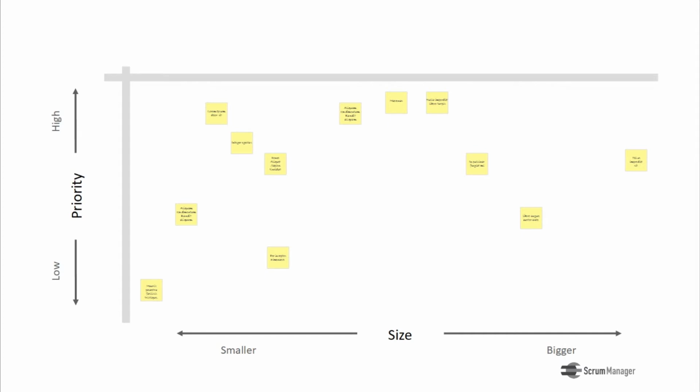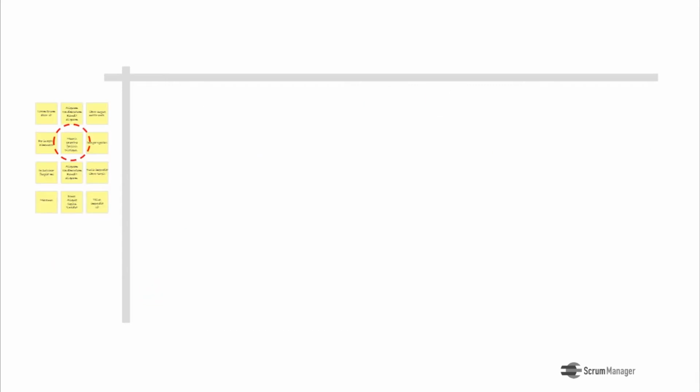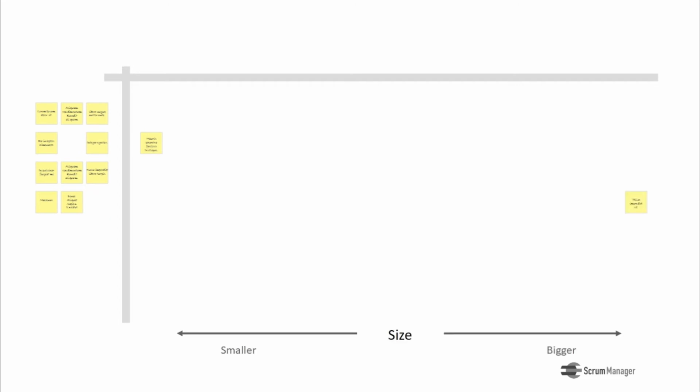The most common procedure is as follows. The team first selects two stories from the product backlog, the smaller and the larger one, placing the first one on the extreme left of the board and the larger one on the extreme right. Then they select the story that can be considered half the size of the larger one and place it in the middle.